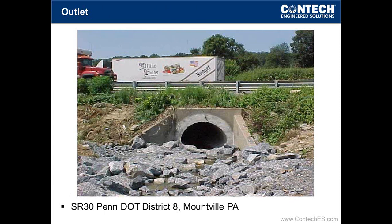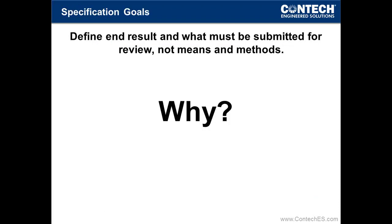And then here's the example of the finished product. Here's a pipe arch application, low cover over the top of the structure. In many cases, this whole job was, I think, 168, 170 feet. It took about 8 days from the beginning when they cleaned the host pipe, relined it with the new product, and back grouted it. Within 8 working days, in this case, they were off that job while maintaining traffic, and really the public didn't even know they were down there working.